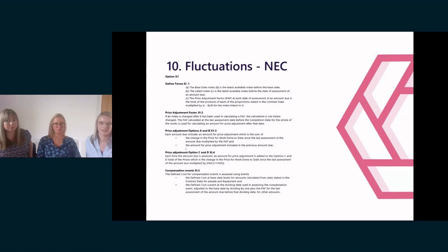Essentially, there's an agreement to say that it's paid out in the same way as a bond would and for the same reasons, but the bond itself doesn't actually need to be obtained. Alternatively, there's the provision for hire retention. Again, not a popular one with contractors among you, I'm sure, but it can be a way of getting around the bond issue. Yeah, no, definitely. That's exactly what we've seen.